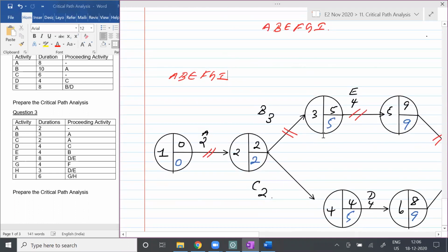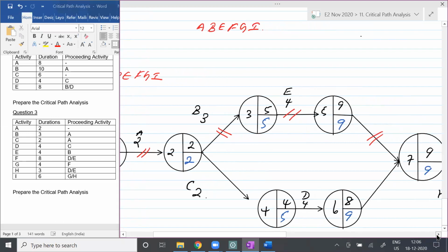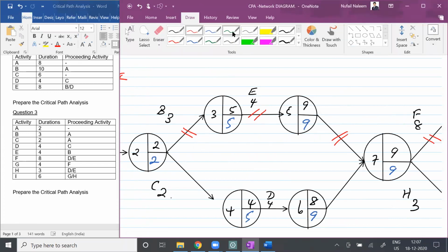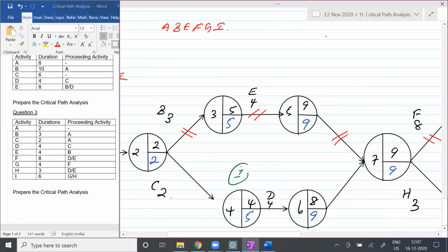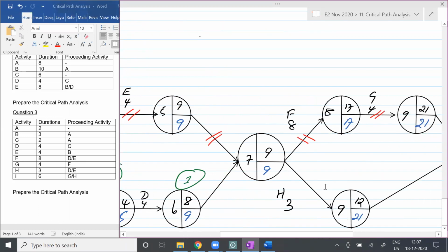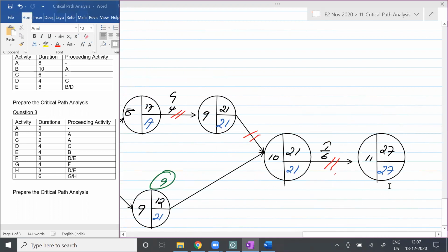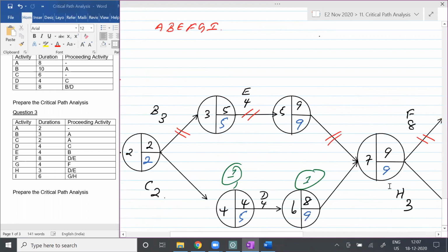So students, can we do the slack element also, if I'm not mistaken, yes or no? So the slack here, you have a 1 day slack, right, students? Here 1 day slack is there. You can delay it for 1 day, and here it's going to be how many days slack, students? 9 days slack, right? Agree, no, students? Are you clear with what I'm saying there, students? Yes or no?